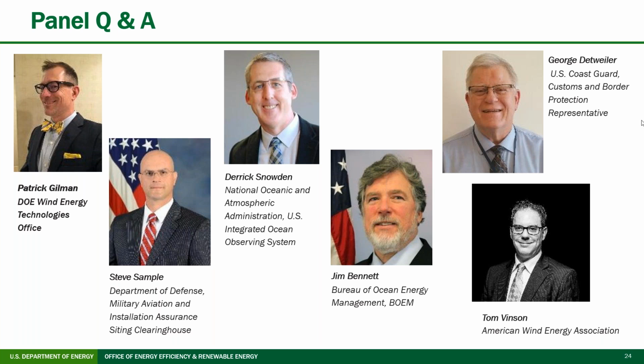George, anything to add? Patrick, not really. I think Tom hit it quite well. I think we in the Coast Guard try to be very cognizant of the developers' timelines. There's just certain things that we can't provide to BOEM or the developer unless we have certain information up front, for example, the size of the wind farm, or the orientation of the wind farm, or the spacing of the wind farm. And we realize that's at a certain point within the actual project timeline. But the earlier we can get that, hopefully we are making ourselves available.